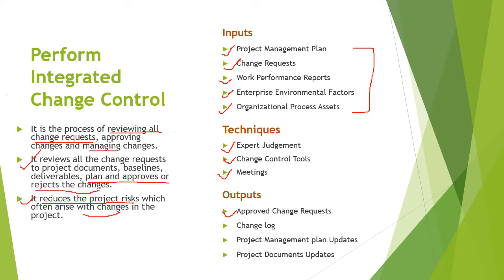The next is the change log. We already discussed it. A change log is basically used to document changes that occur during the project. These changes and their impact to the project in terms of any attribute, such as time, cost, and risk, are communicated to the appropriate stakeholders.